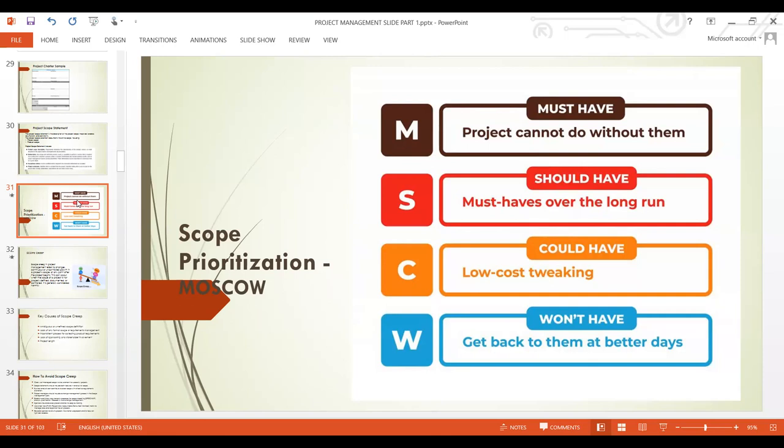But when are you doing it? Which one comes first? Why is it coming first? Are there dependencies? Must requirement A happen before requirement B happen? Is requirement B dependent on requirement A? Or are all of them dependent on each other, or are they independent deliverables or independent activities? You must state all of their dependencies. And again, here is where you need to state the most pressing need.